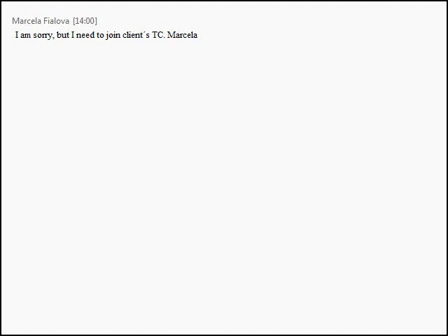So what we need to do is account for workflow management in our resource forecast, so we can get that half a day FTE for workflow management, because at least for Team 1B, it's a half a day job. It's a 4 hour a day workflow manager. There is one tricky part here. Theoretically, if we organize the workflow better, there should be some free resources as a result of it. So I don't think we can just ask for more resources just because we are implementing workflow managers. But in some situations, we might need to.